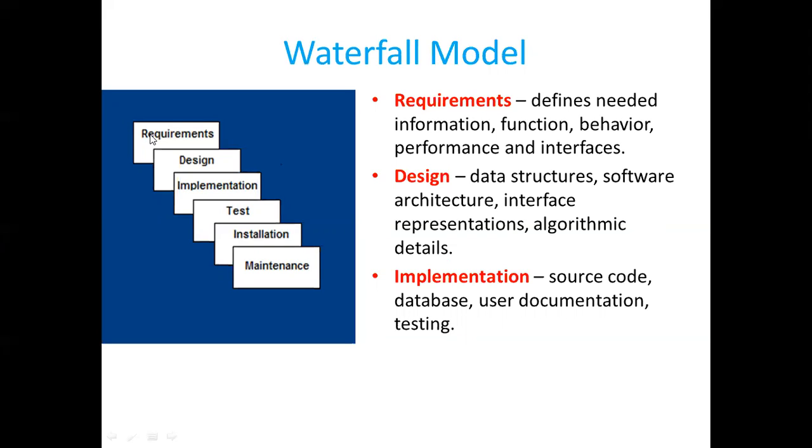Sometimes it is just adding some new diagrams to the design document, but sometimes you require to redesign it. When the customer says some existing requirements have to be modified or new requirements added, it may be possible that you have to redesign the entire design document, which involves a lot of time.